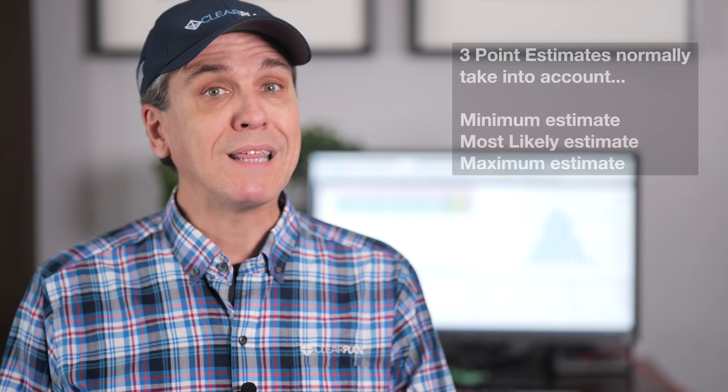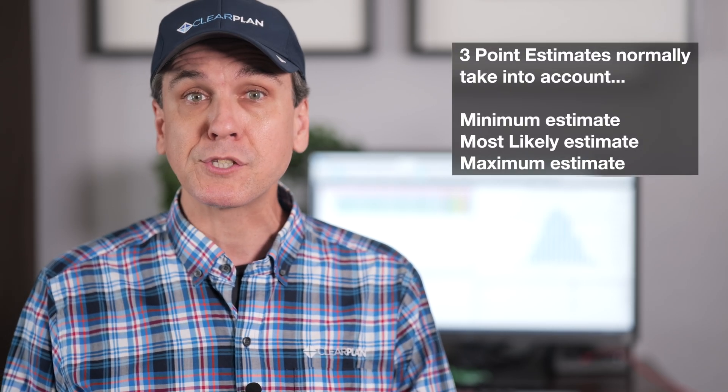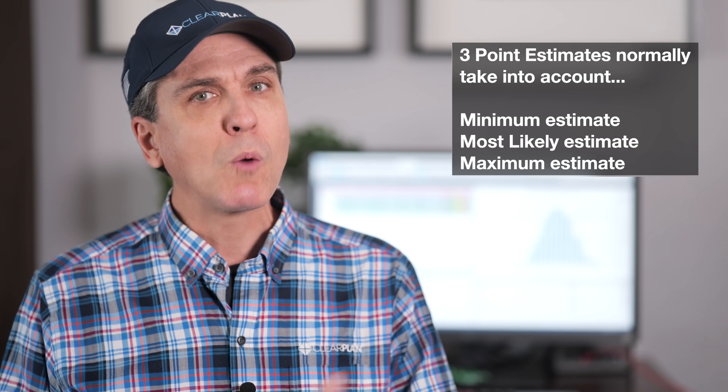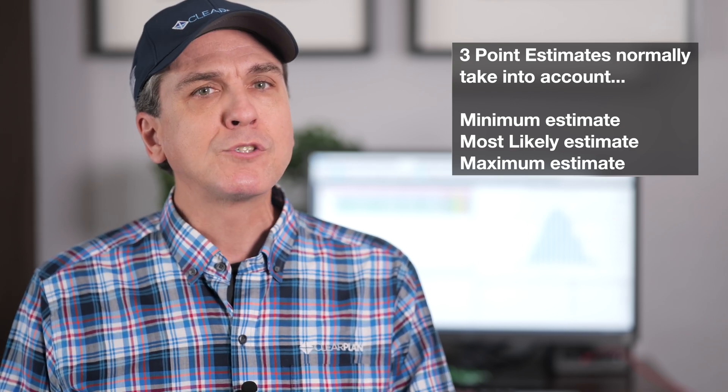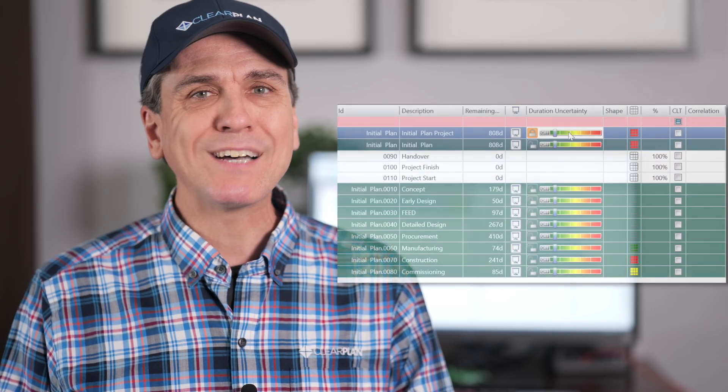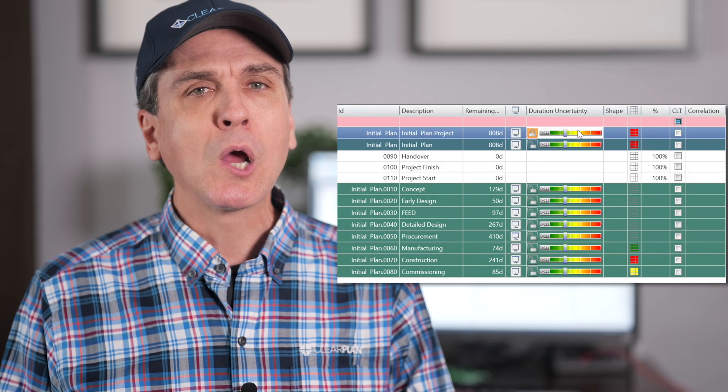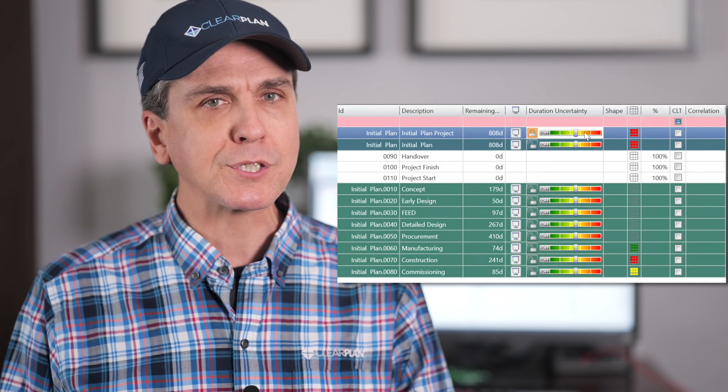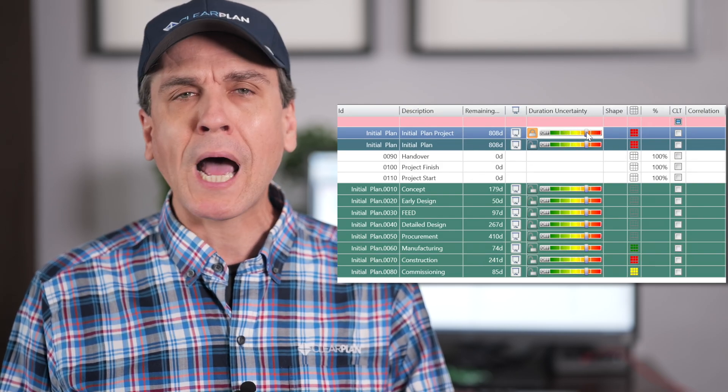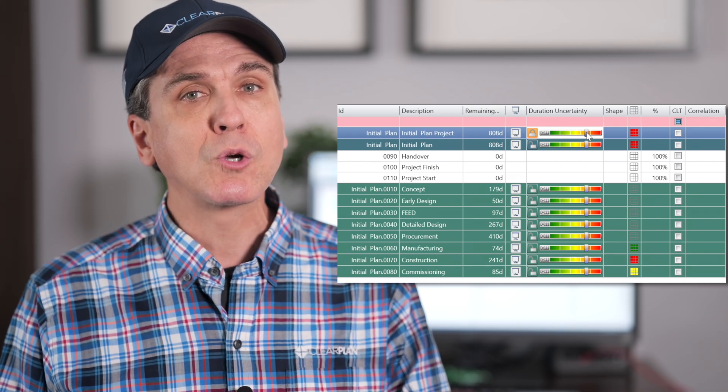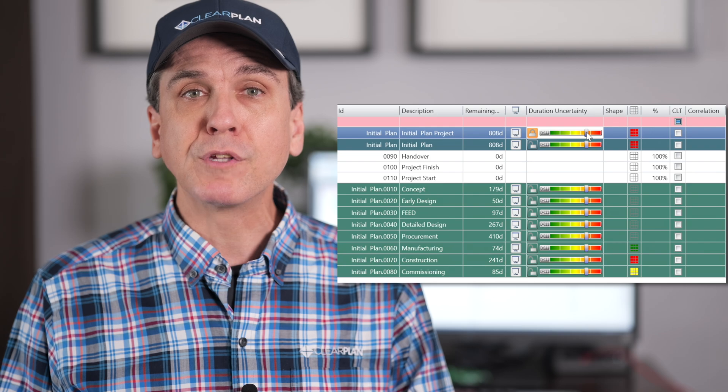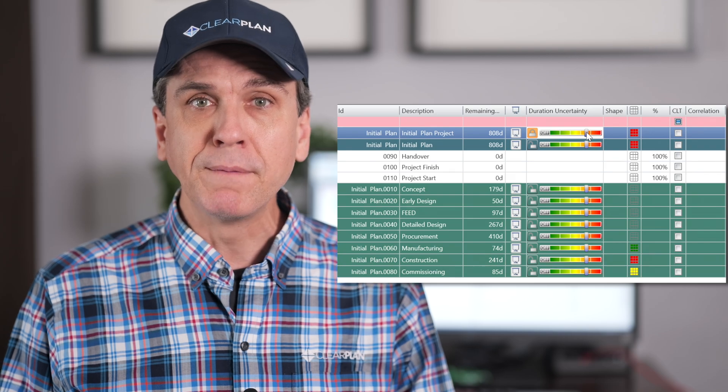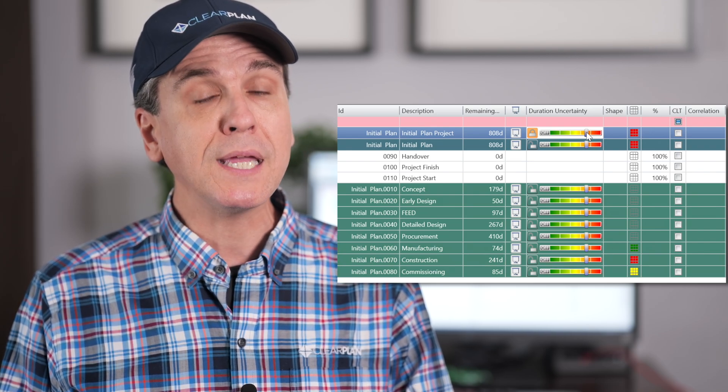This can be three point duration and cost uncertainty estimates. And some tools will help you make these assignments easier so that you're not doing a lot of typing. For example, Deltek Acumen Risk has these red, yellow and green sliders, useful to assign what I call a risk temperature to a task or to a roll up. The closer that you move the slider to red, the more uncertain your project team is about the outcome of the work. In Acumen's case, there are sliders for both schedule uncertainty and cost uncertainty, although some organizations may choose to take advantage of only one or the other.